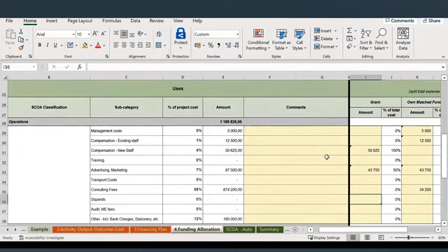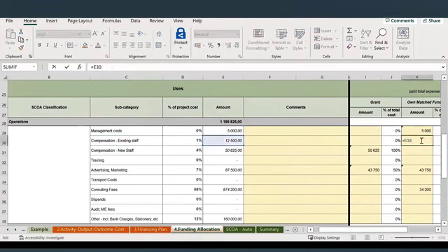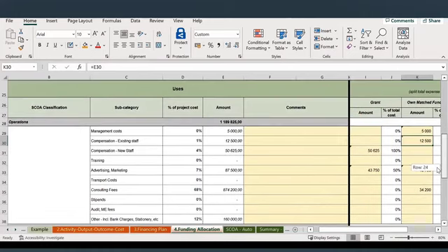There are certain things that we would prefer you carry, like existing staff compensation. No, you're already paying for that. Continue to pay for it. What we might negotiate with you on is if there's incremental allocations to that particular staff member of the project, but we don't want to see you bring your whole existing staff budget to the project because you're not necessarily showing us additionality, but also we're not necessarily risk sharing. You're just continuing to do what you have always been doing.